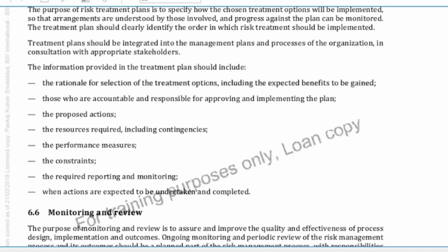So for example, 24/7 you are monitoring the system logs, but you do not review the system logs every minute. You periodically do it, maybe once in a day, maybe once in a week, maybe once in a quarter, depending on the sensitivity of the process. Similarly, monitoring is going to be continuous, but you will periodically review. Okay, how effective is my risk identification? Have I been able to see what are the future risks? What about the monitoring of the risk treatment plans? How many risk treatment plans have been implemented? How many have been successful? How many had to be repeated? So this is what is monitoring and review of the risk management process and its outcome.